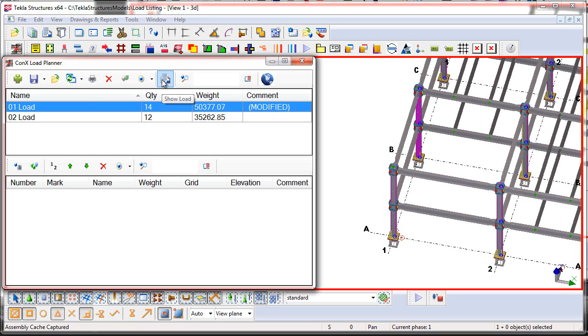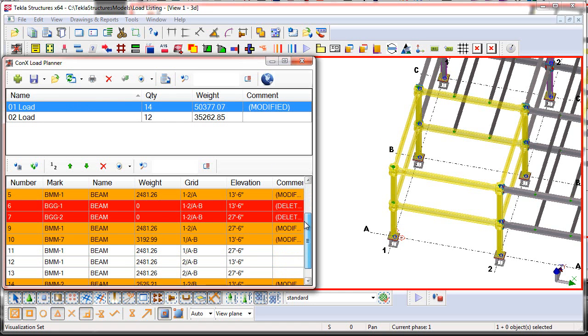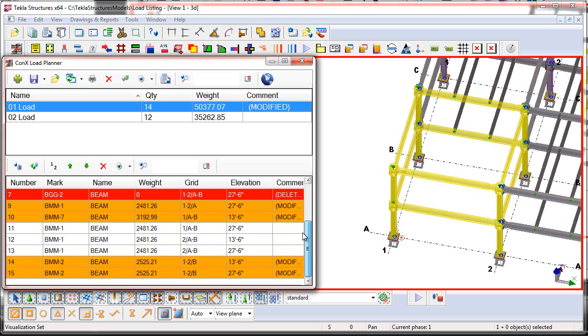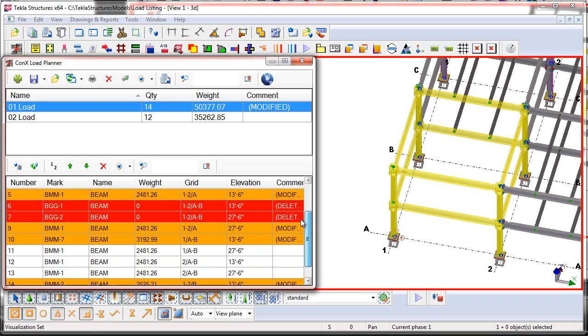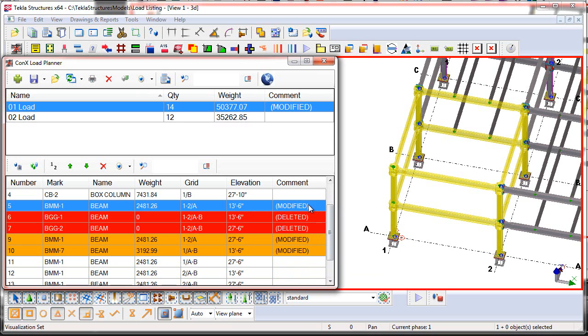So we'll select the 01 load here on the list, and press the Show Load button. This will then show all of the assemblies, and which particular assemblies have been modified or affected. The orange assemblies represent assemblies that have been modified, which we can then see here in the Comment column.